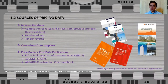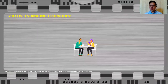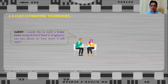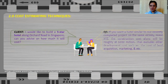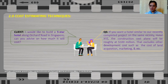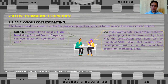Now that we know what is needed to carry out a cost estimate and where to find a source for your pricing data, let us talk about the techniques used in cost estimating. Let's take a look at this meeting between the client and the quantity surveyor. Here, the client informed the QS that he intended to build a hotel along Orchard Road in Singapore and is asking the QS how much it will cost. With this limited information, the QS responded that if you wanted a hotel similar to a recently completed project in the same vicinity, the construction cost alone will roughly be at $100 million. That excludes other development costs such as the cost of land acquisition, marketing, and so on. With the limited information, the quantity surveyor was able to provide a cost estimate using a technique called analogous cost estimating.